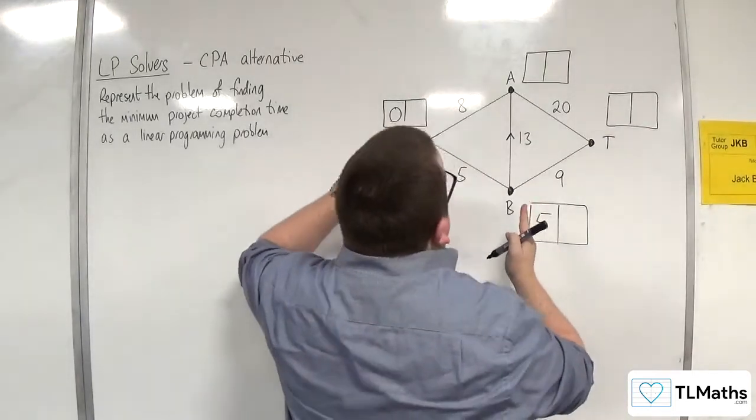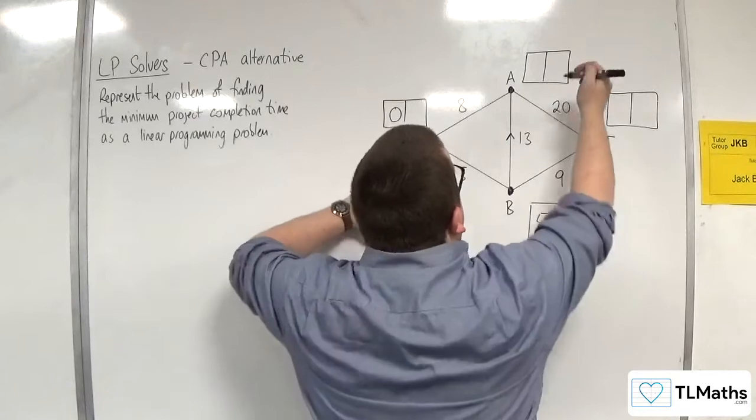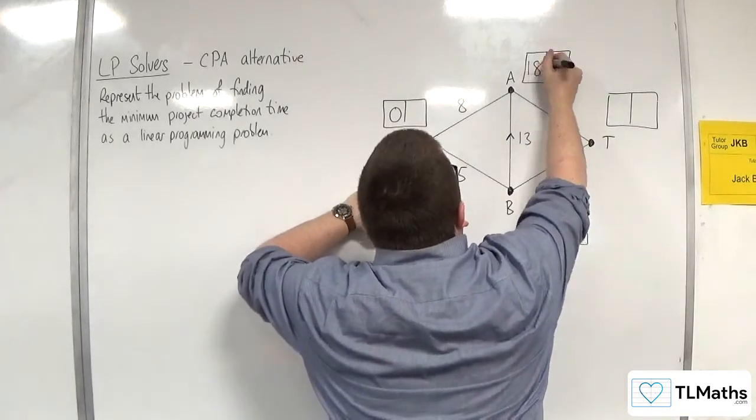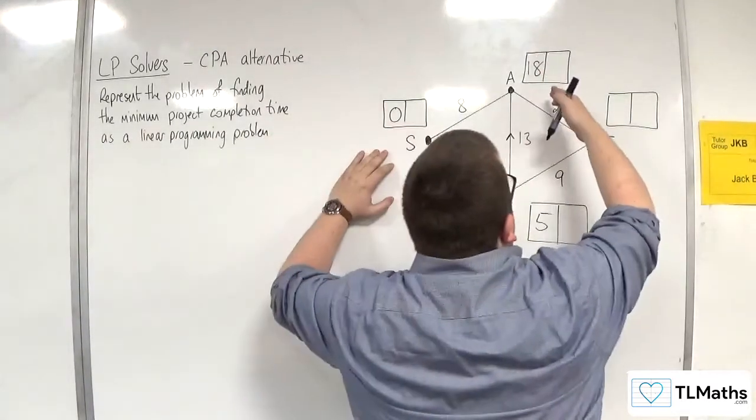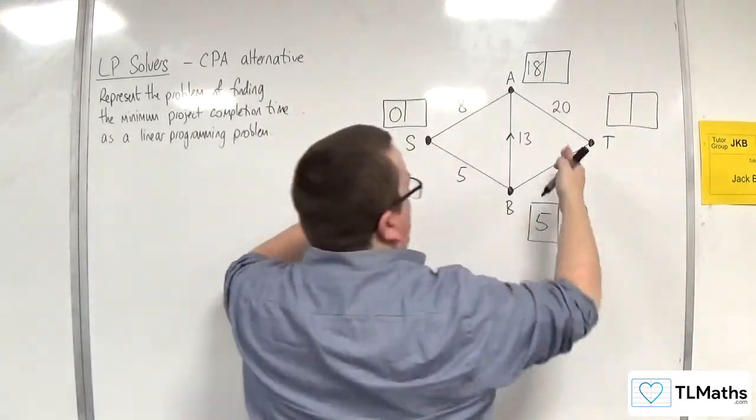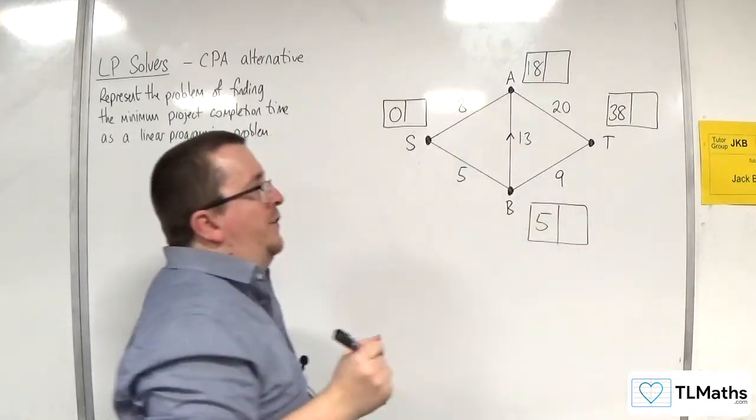Then for A, it's either going to be 5 plus 13, which is 18, or 8. You take the larger of the 2, so 18. And then we've got 18 plus 20 is 38, or 5 plus 9 is 14. So 38 is the earliest completion time.